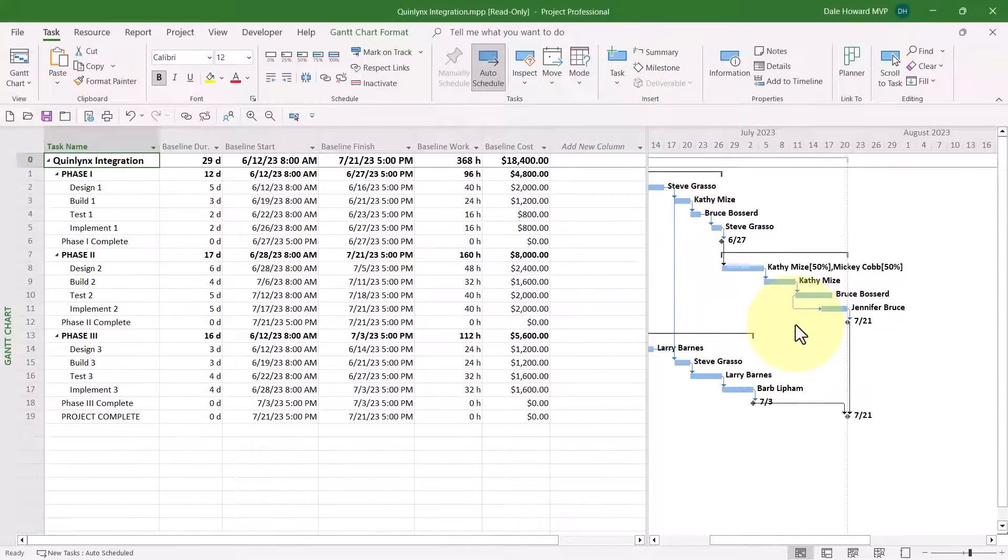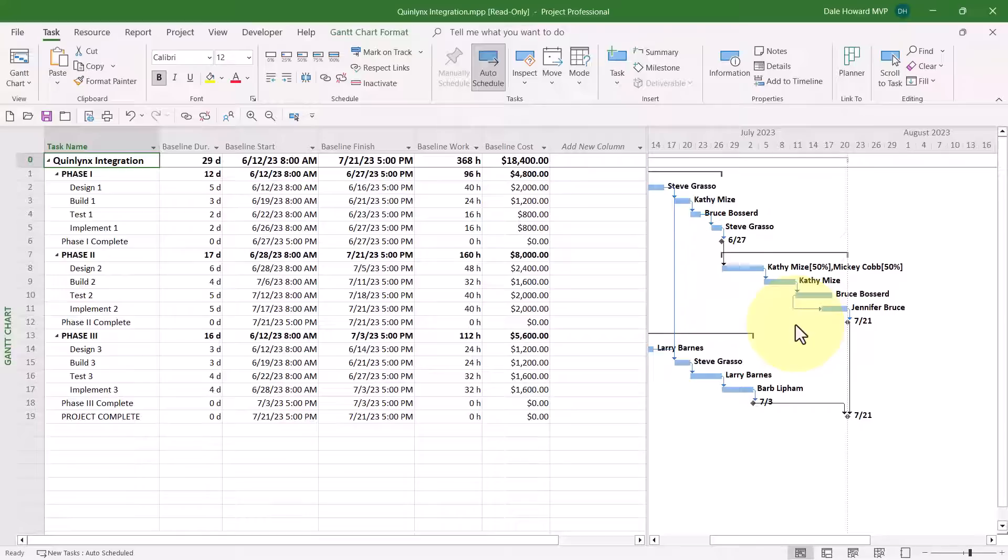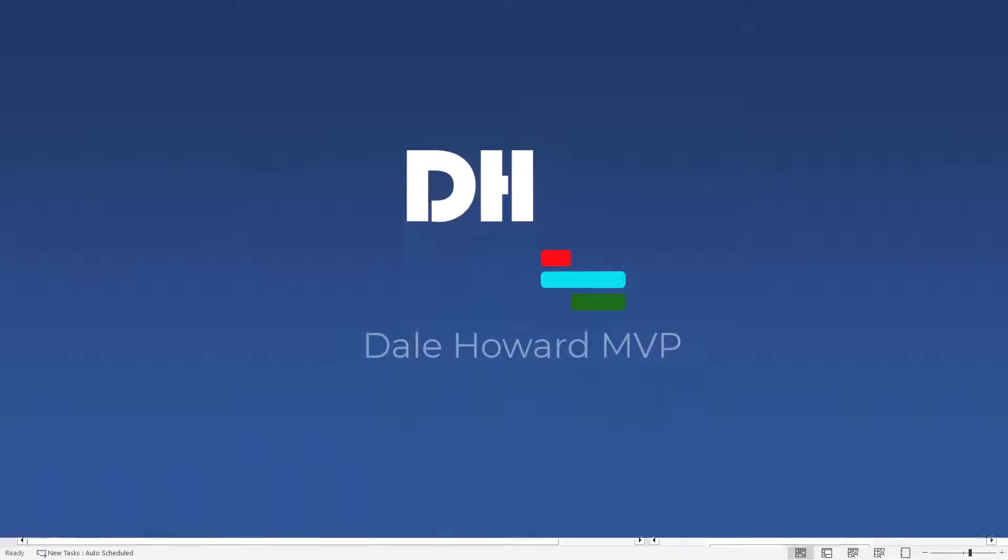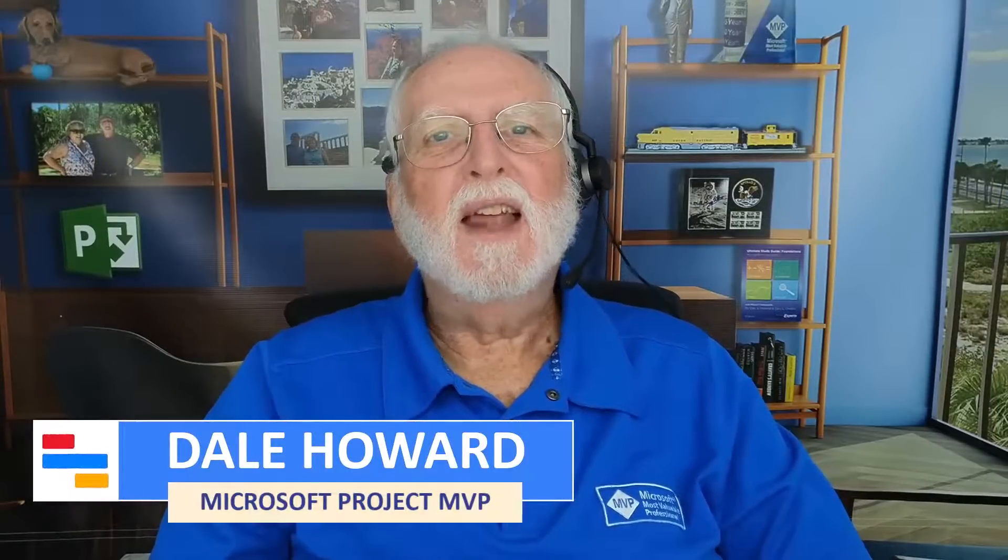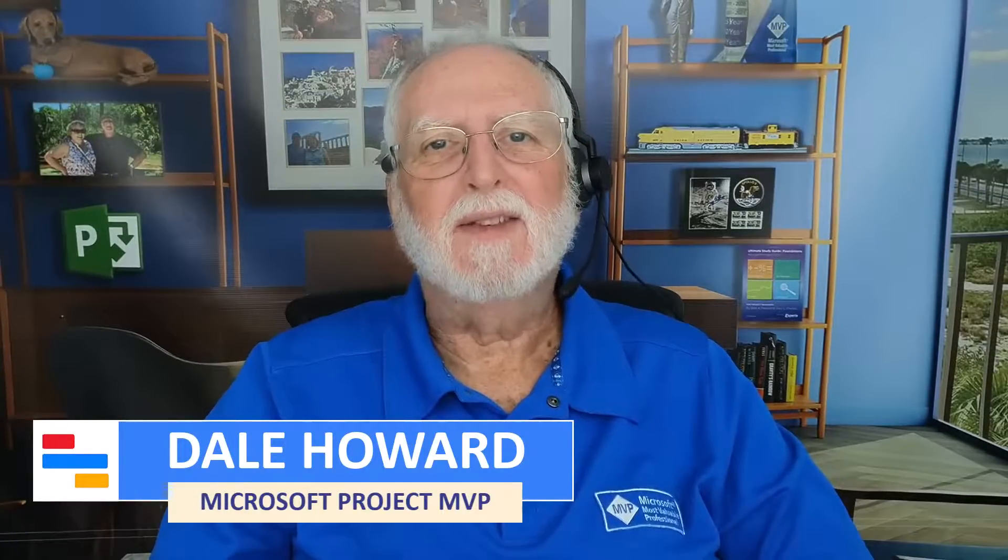Baseline Start, Baseline Finish all have the correct date formatting. So the trick for formatting the dates in a particular project is to change the formatting of the most commonly used tables in that project, which include the Entry table, the Variance table, the Usage table, and the Baseline table. Now you know the secret for setting date formatting on a project-by-project basis.